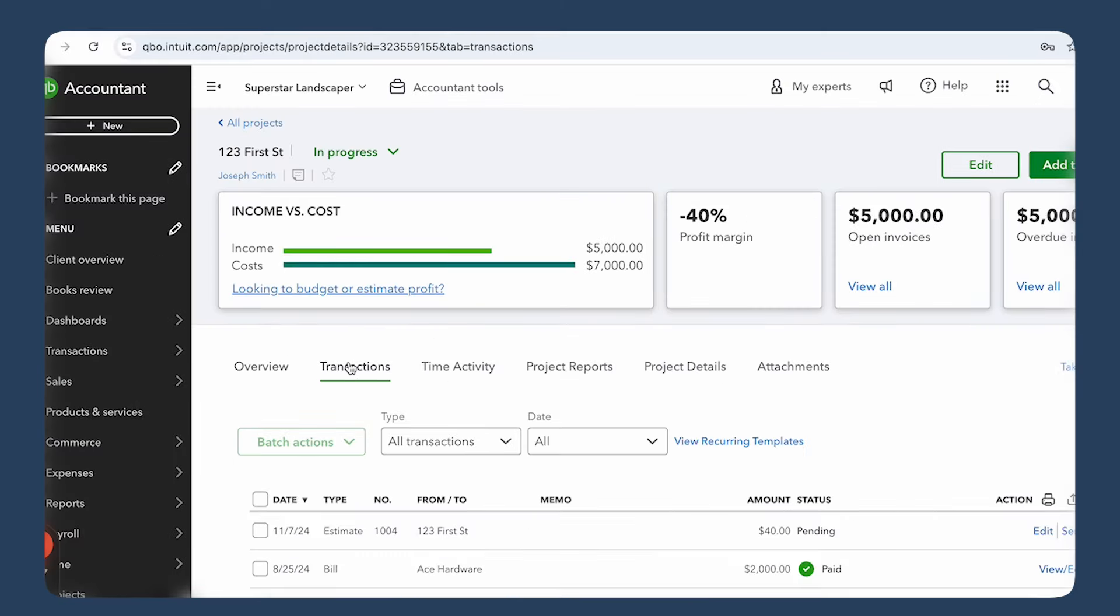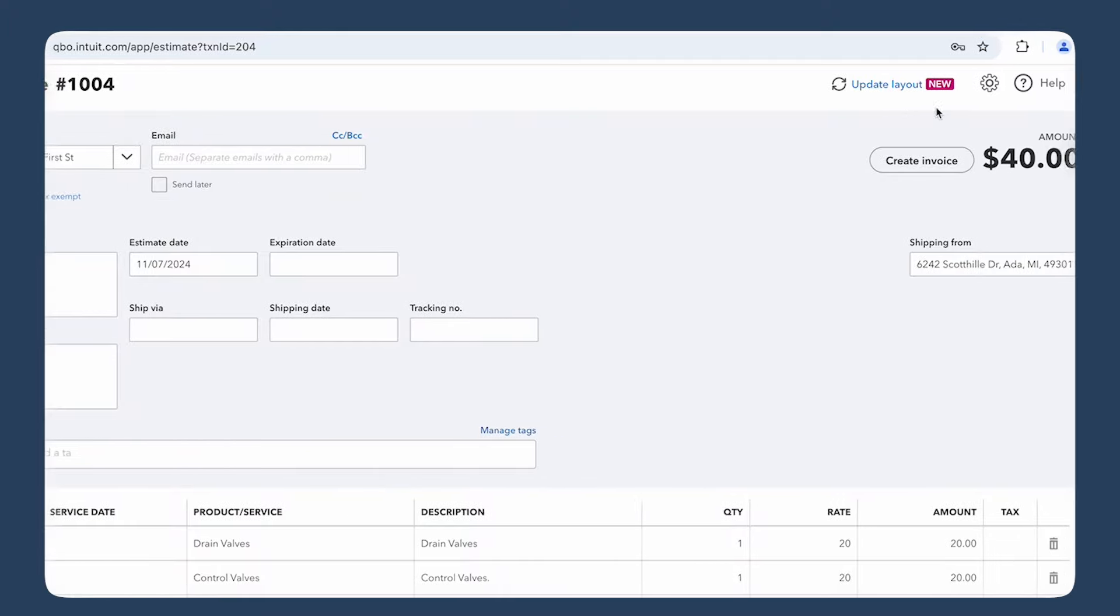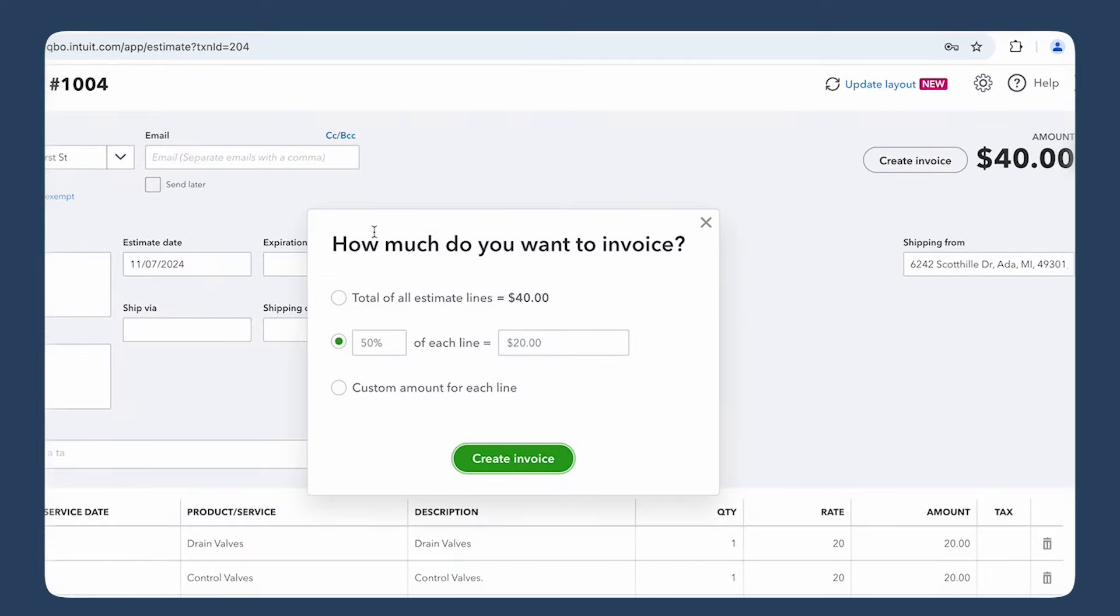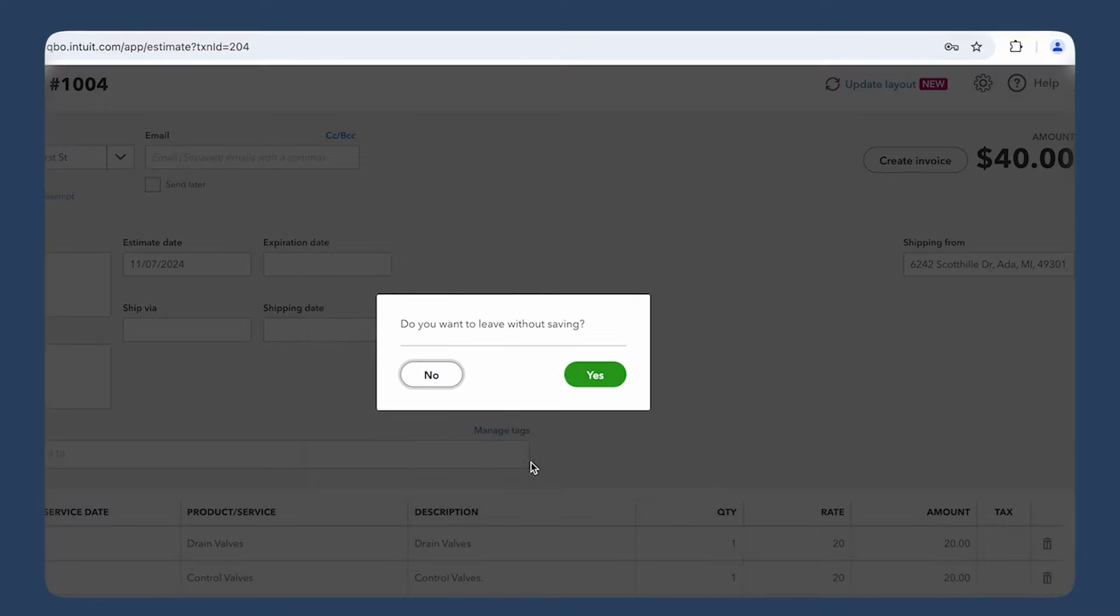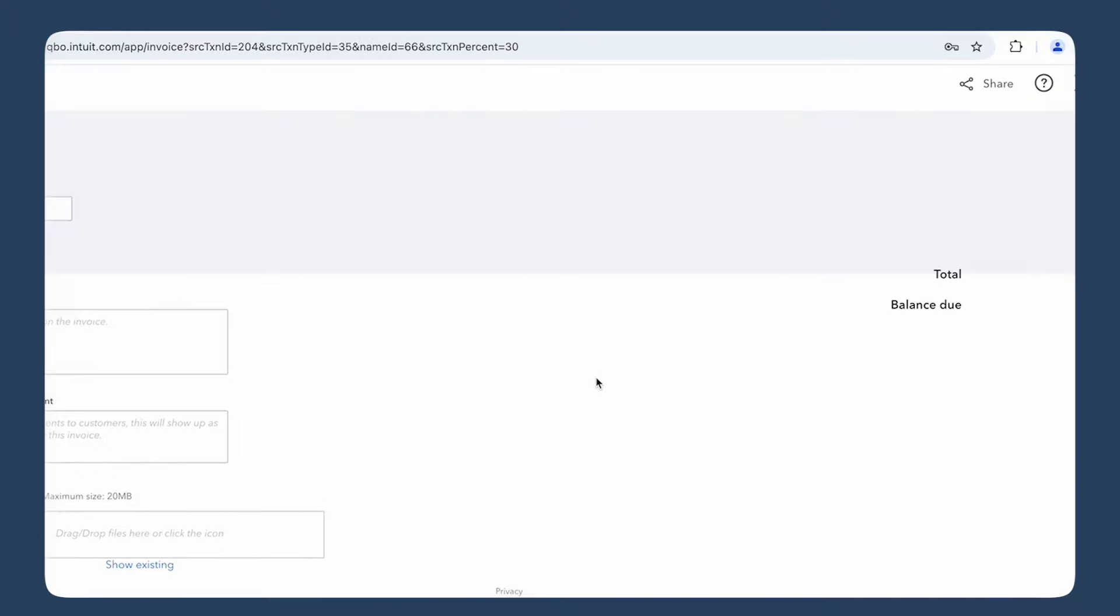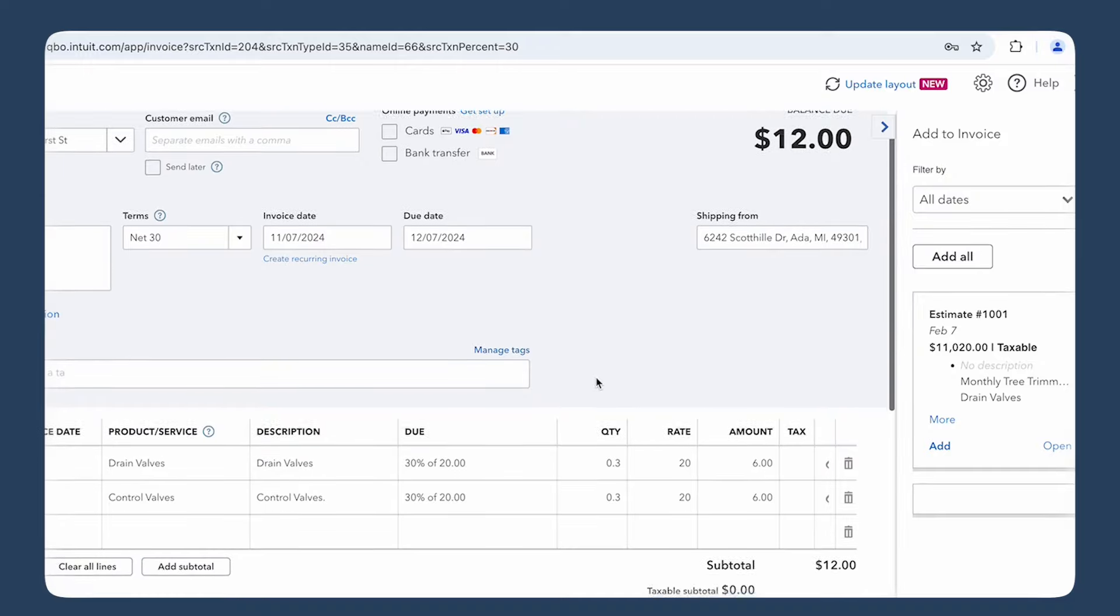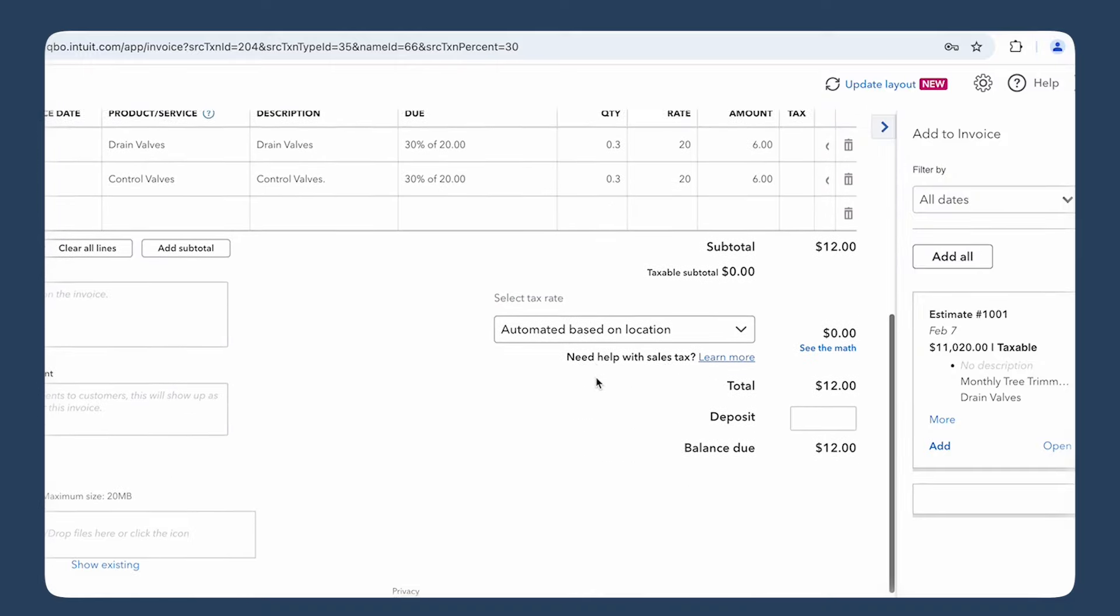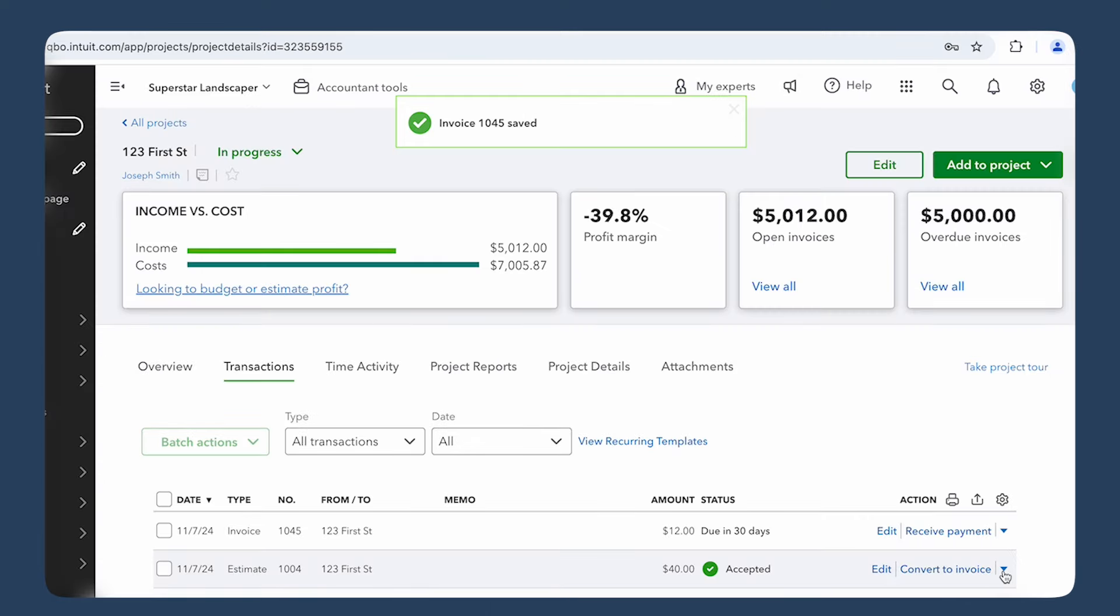Now let's create a sample progress invoice. Go back to your estimate, click the drop-down and select Create Invoice. You'll get a pop-up that asks if you want to invoice for a percentage of the estimate or specific items. This is where you can choose to bill for, say, 30% of the project up front or for the materials you've already used. Adjust the percentage or item amounts based on how far along the project is. Add any memo information and any attachments. Click save and send to email the invoice to your client.